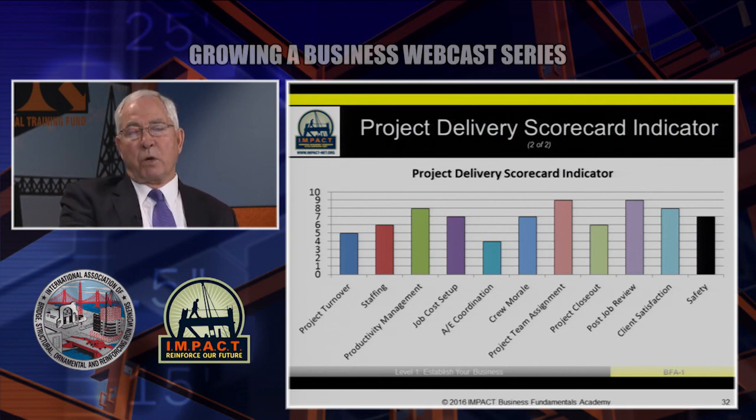They don't close the projects out on time, and some of them actually will sign what they call a quick finish team at the end of a project to make sure that the last 5 or 10% of a job is closed out as efficiently as possible, because things tend to drag at the very end and run up a lot of extra costs that could be recovered.